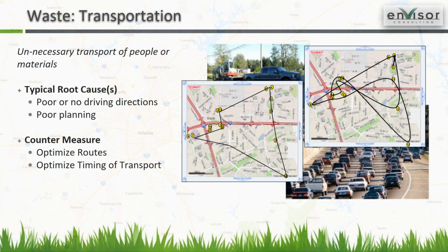So thinking about traffic patterns, crew sizes, thinking about mobilization hard really does pay us back, particularly in our industry. It's not just the waste of the guys that are driving around out there, but there's also a safety risk with being on the road. We burn fuel when we're out there. And if you've got 3 guys in a truck for 20 minutes, it's an hour. It's an entire hour of productivity that we've lost that we can't get back. 3 guys for 40 minutes is 2 hours gone.